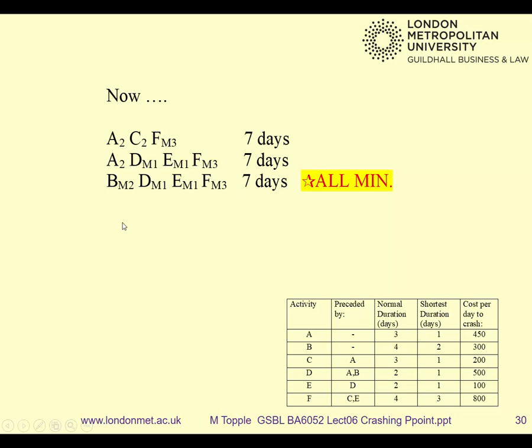And now how do we get it down to 6? We can't. You can, but you will not decrease the critical part, so there's no point carrying on. If you did A and C, you'd make these shorter, but what would happen to this one? You'd waste money.